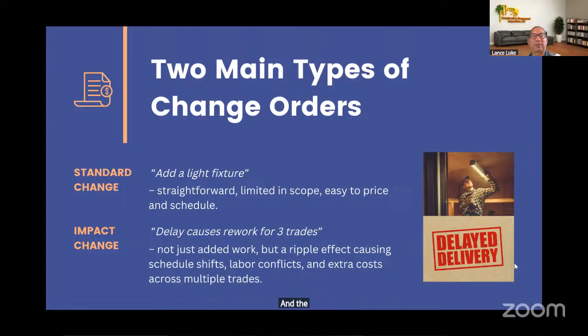And the light fixture itself cost $200. Okay, so question, is the contractor entitled to bill for $100? Because that was the additional cost of the additional light fixture. The answer is yes, because that was the extra cost, right?